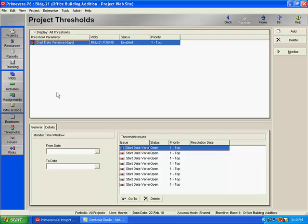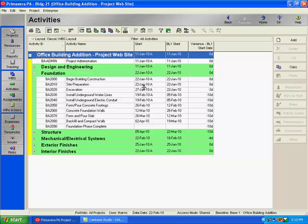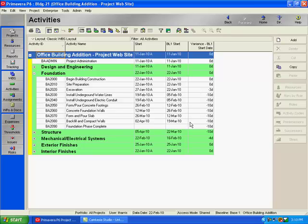I'm going to go back to my activities window and just recap one more thing. Again, it's best after you status your schedule to run apply actuals. And that will then display the variance or calculate the variance just for the problematic activity versus generating issues for all of the successors to the problem activity. So if I apply actuals, it will only select the problem activity versus all of the other activities. And that's why it's important to apply actuals before you actually re-forecast the schedule.